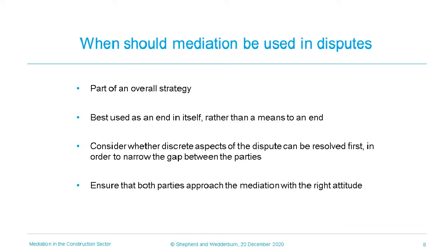That information and knowledge gained may be sufficient to bring the parties close enough together to consider mediation. We would therefore generally recommend that mediation is only considered once parties have a very good feel for each other's position and are at least open to the possibility of settling the dispute. It's also important that parties approach mediation with the right attitude.